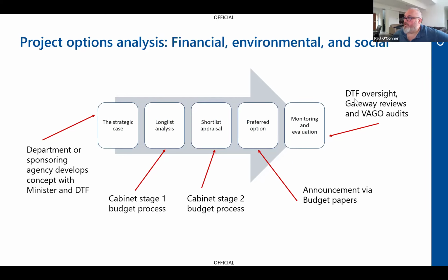So we've got a couple of agencies. We've got DTF provide oversight, and that's usually a mixture of time, cost, and scope. They will be looking at that and risk. So they are often also analysing risk in the project. They often have a red, amber, green. So if it's red, amber, or green, they provide that advice to Cabinet.